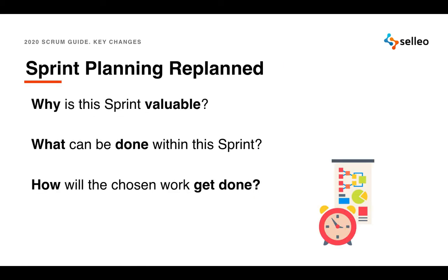Why is this sprint valuable? Product owner proposes how this sprint could increase the product's value. And we have an obligatory sprint goal to be defined by the whole Scrum team before finishing the sprint planning session. Another question: what can be done within this sprint?